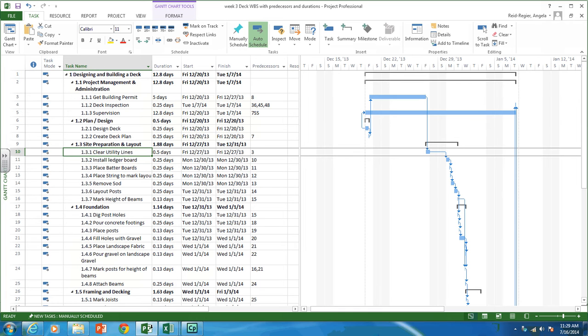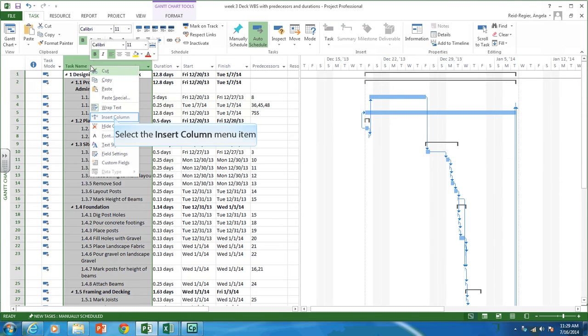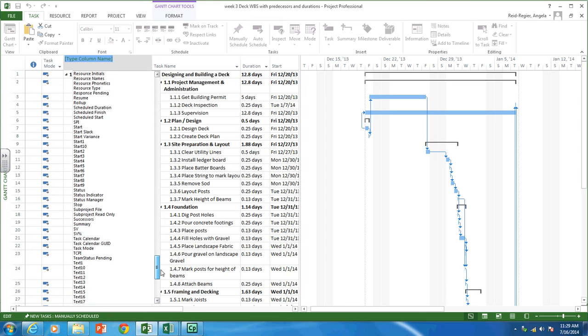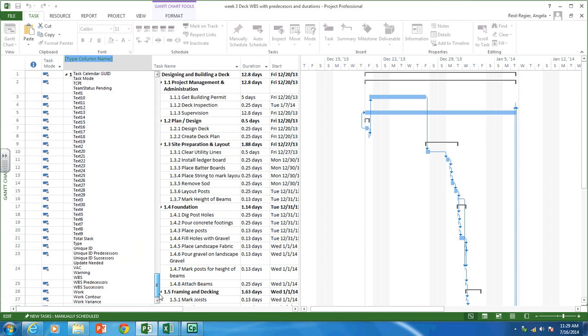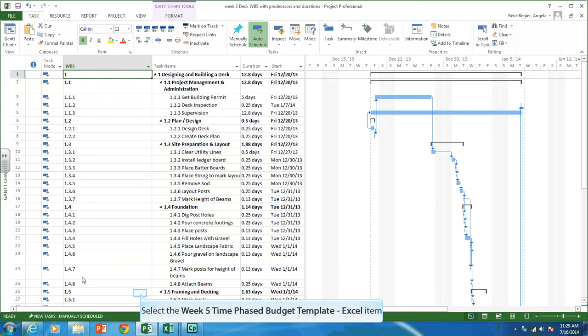So the first thing I want you to do is I want you to add a column in your Microsoft Project deck project with the WBS code. So you're going to right-click on the Task Name column. You're going to click Insert Column. And we're going to find WBS. So there we go. There's our WBS codes. So we need that.